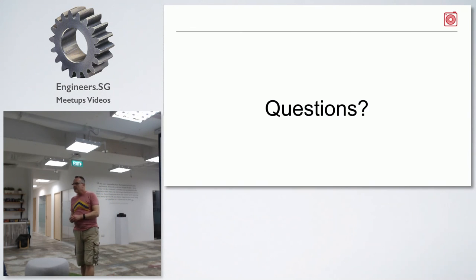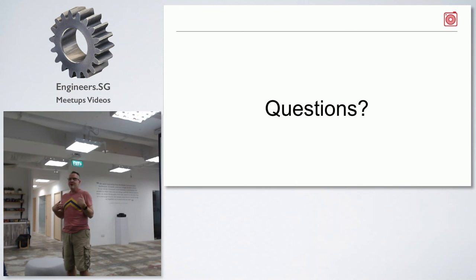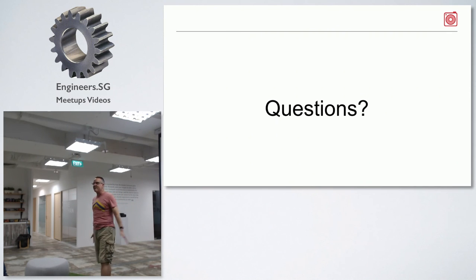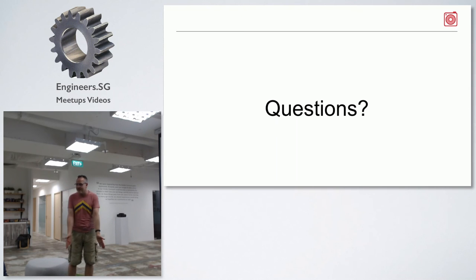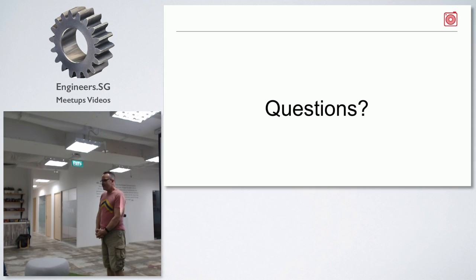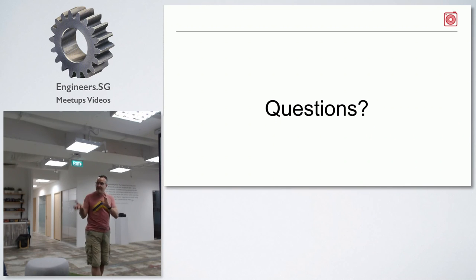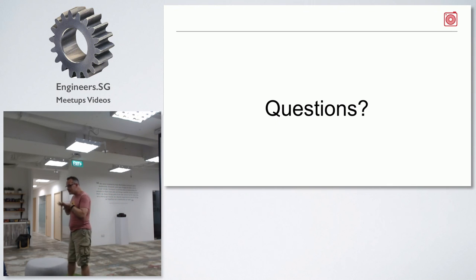Bugs tied to the stories you're implementing — that's part of implementing the story; you write them up and put them into the sprint. If you're going to do something like a refactor, that's a task — but ask yourself, are you really delivering customer value? I have to pull myself in and say no, this will make me feel better but we're not delivering any customer value. The PO decides what gets done. The team decides how it gets done, how long it takes, and how much they're going to commit to. There's a tension there, and that's a good tension.